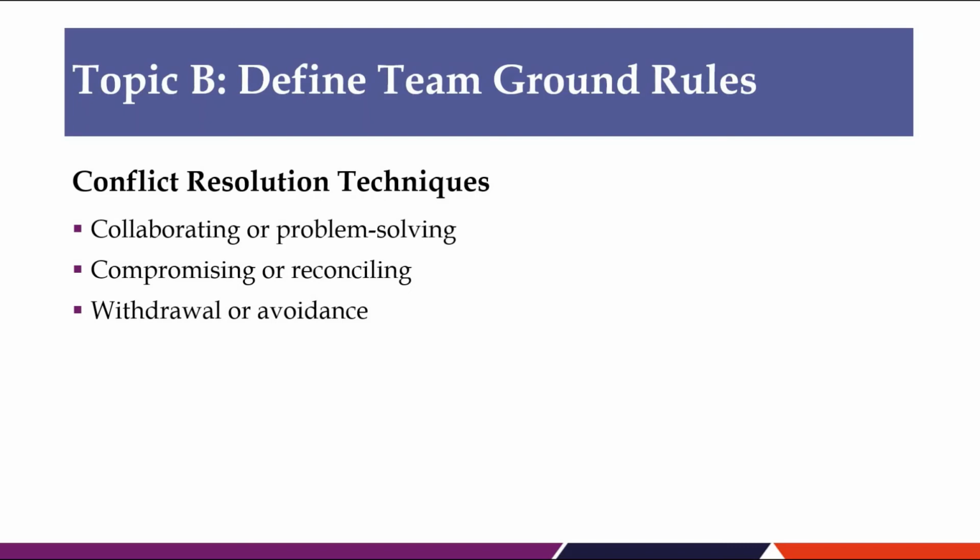Smoothing or accommodating. This technique involves making some concessions and it emphasizes agreement rather than differences of opinion. It does not result in a permanent or complete resolution of the conflict.